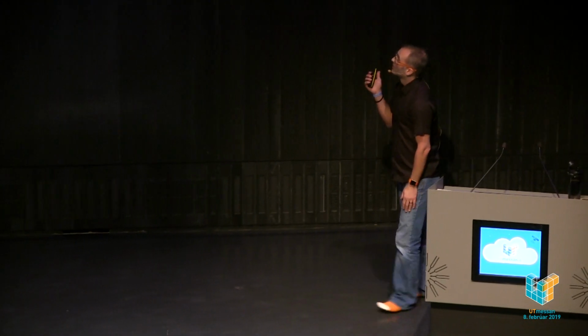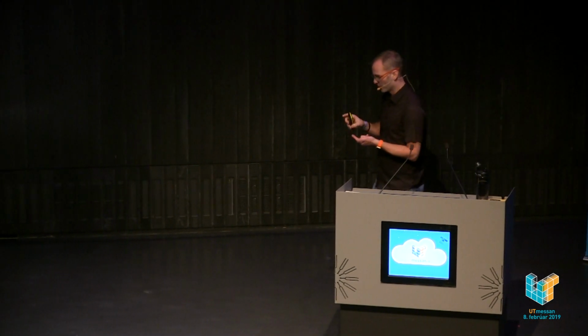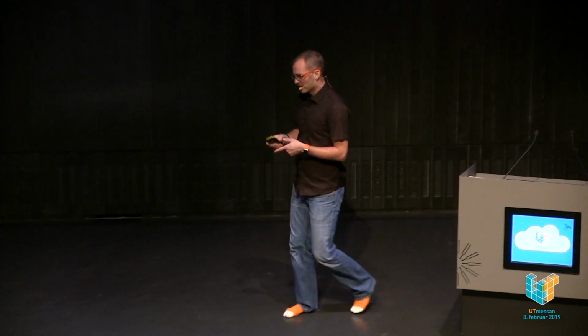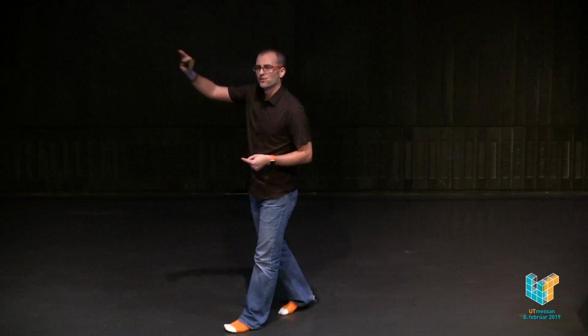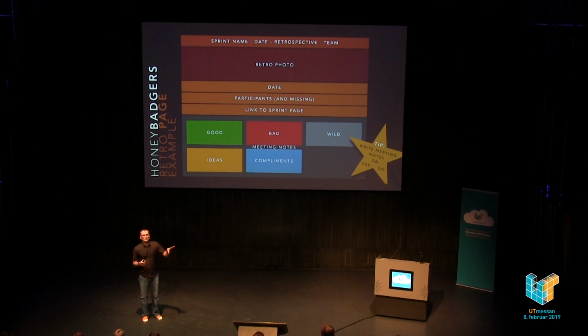But what we actually did is that we started writing the notes on the go. And I'm especially going to say that this is a pro tip, because it actually gave everybody direct feedback on the screen of what the notes were, so they could change them or say something if something wasn't right. And I didn't have to spend time afterwards putting the notes in.